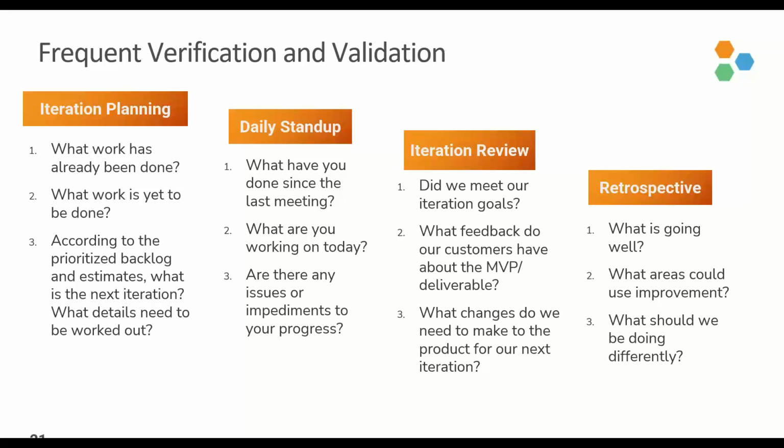And then we have the iteration review meetings, and that's at the end of each iteration. This type of meeting is to demonstrate, or demo, the new work that has been completed, that deliverable or the minimum viable product, to the customer and the stakeholders, and verify that they're building the right product so far, that they're on the right track. Getting that feedback, like we showed at the beginning with that loop.